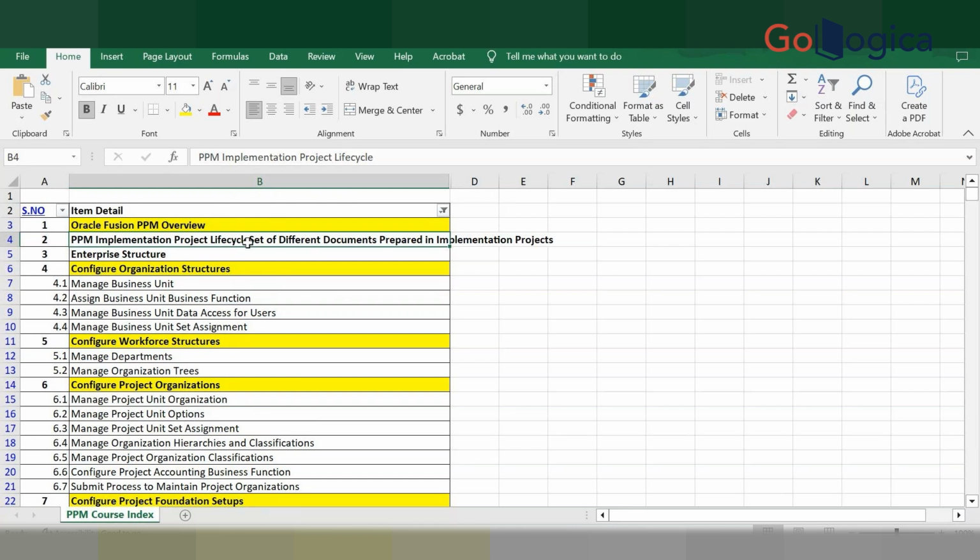The majority nowadays go with the agile methodology, where you develop, deploy, and test, and then go to the next phase or sprint until go-live. Some customers who have many entities or a good amount of business structure go with a phased manner, taking a few entities in the first phase, second phase, third phase, and bringing everything into Oracle so they use the system effectively. That's where I have seen clients implementing Oracle in phases rather than at one go when they have a huge business across the globe.